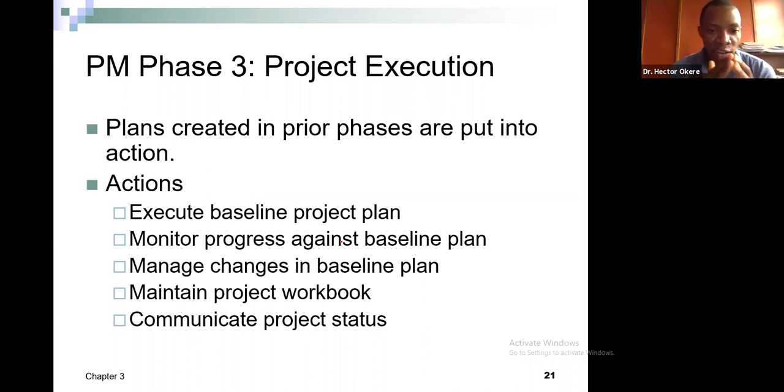But if you have budgeted for you to finish activity 2 at week 3, but you already finished activity 2 at week 1, which means you are fast. That is good. You can have time to slow down or continue, depending on you as a project manager. So all that depends on you. You also need to monitor resources. I budgeted to complete activity 3 with 100,000 yuan. But when you finish activity 3, 1 million yuan is gone. There's a big problem, right? So you need to monitor the progress against your plan.